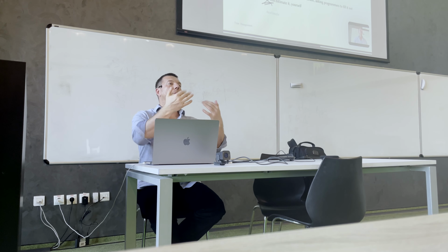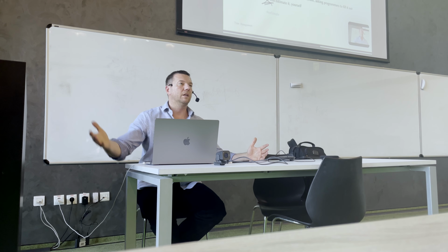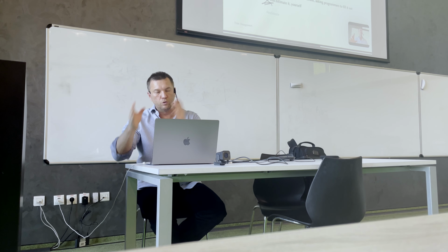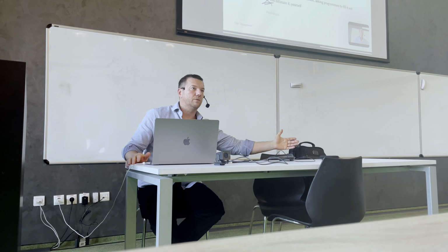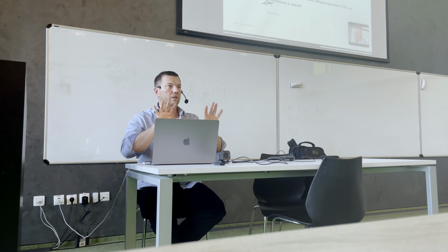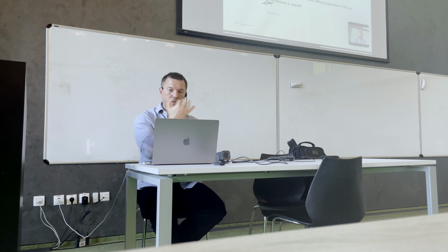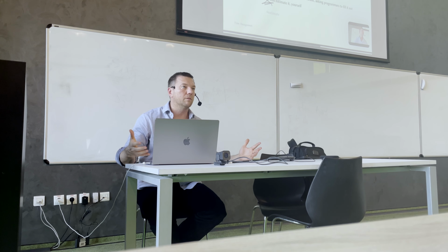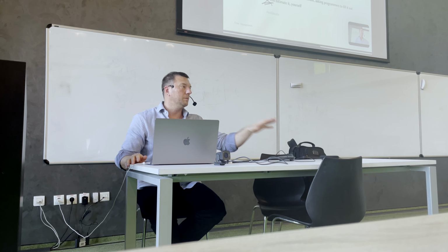Well, let's say I'm a project manager, I have 5 people in my team, and they come and ask, how much will it take? I will draw the spreadsheet, and then I send it to 2 programmers from my team and 2 programmers from somebody else's team. So I get 4 numbers, 4 columns. Then I look at these numbers. If everything looks balanced, then I say, okay, great, I can rely on these numbers. 4 people, 2 independent and 2 of mine, gave me more or less the same numbers. Good, so that's my estimate.